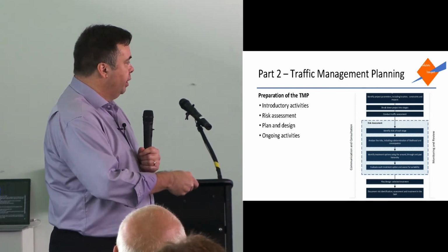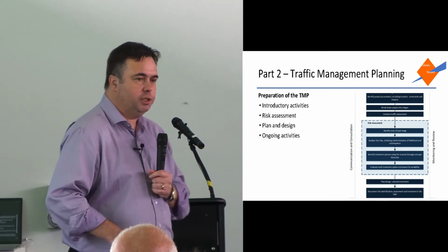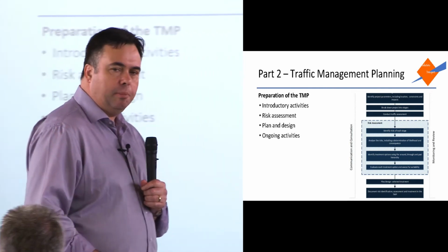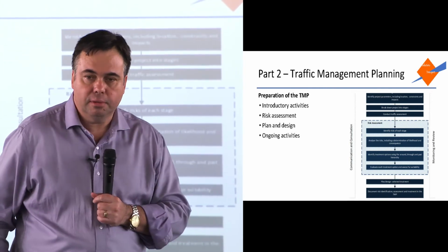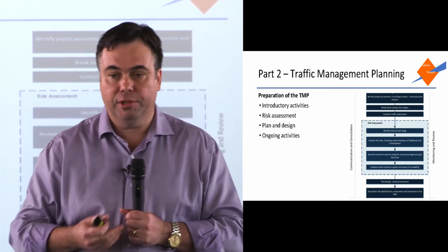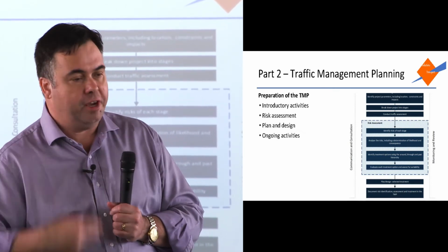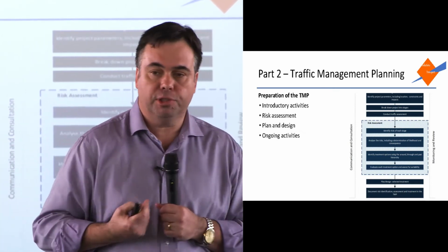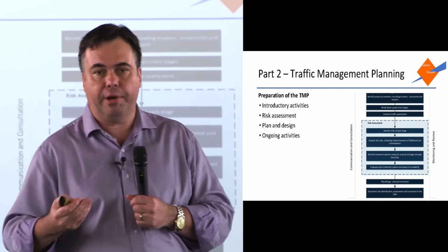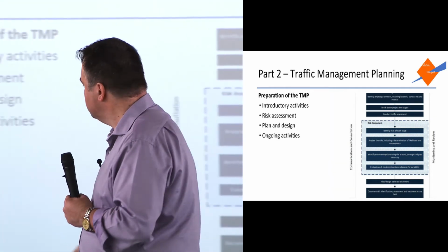One of the things that I really love to point out is these ongoing activities, monitoring and review and communication and consultation. Because quite frankly, if I develop a traffic management plan and you go and implement it and it doesn't work, I'd rather you came back and told me that rather than just keep doing the same thing day after day. Feedback into the loop. I want to learn what worked, what didn't work. And every designer, everyone who's preparing a traffic management plan should be doing the same. Always consider that feedback loop.